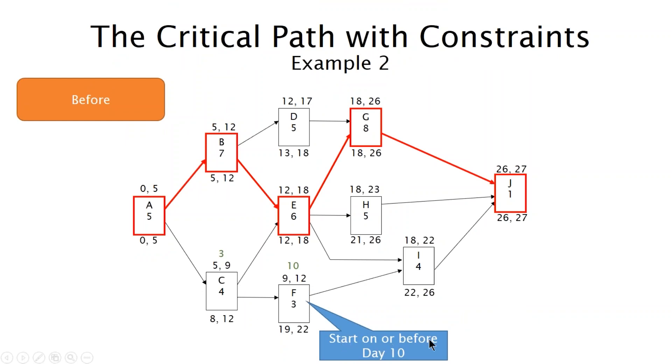In this case we're applying a start on or before constraint day 10 to activity F. So activity F currently starts on day 9 and we're going to push it one day into the future. And just notice it has 10 days of total float. And the result there as you can see is not much happened. So in the second example where we are using a constraint to move an activity within its available total float, this is the proper way to use constraints. We want to avoid using constraints to alter critical path.